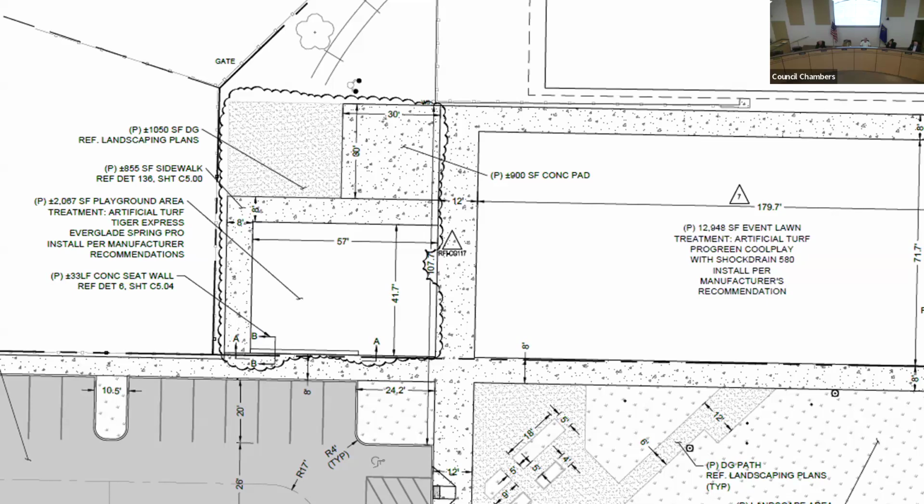But I thought you said that it wasn't included in the original plans. It was included on the civil engineering plans, but when those got put into the final plans, it still said by others. So it was not included in the guaranteed maximum price. What ended up happening was Corps was going to foot the entire bill for the artificial turf. The city is paying for half of it.